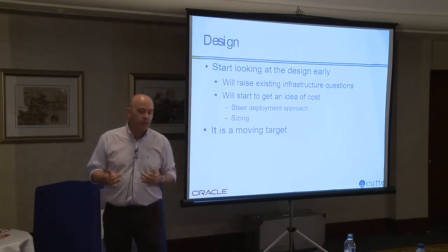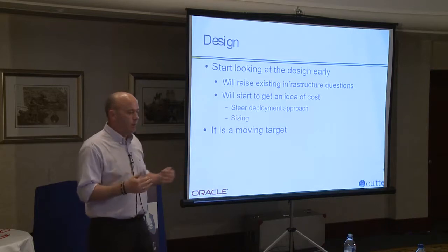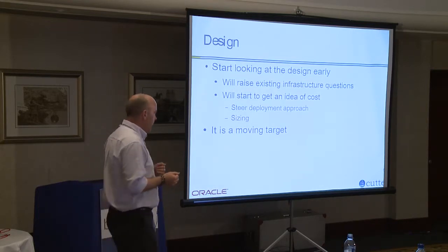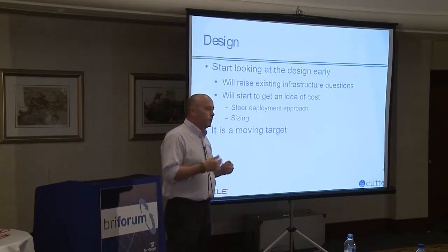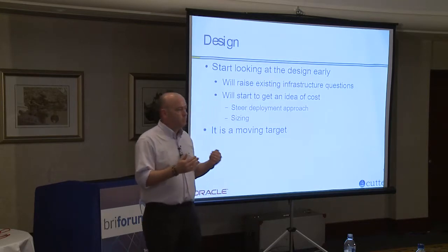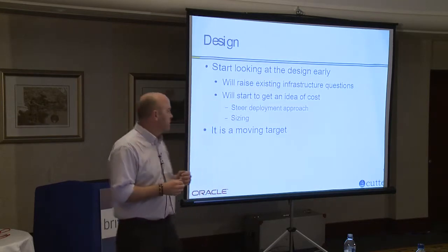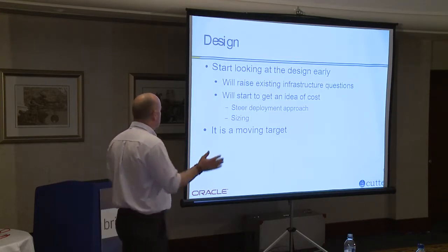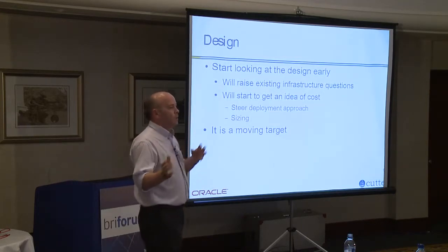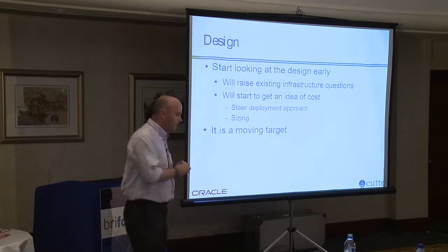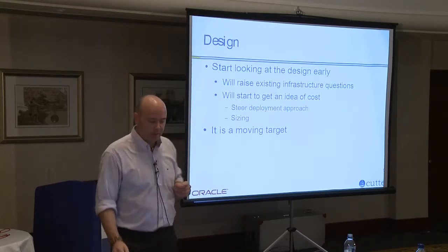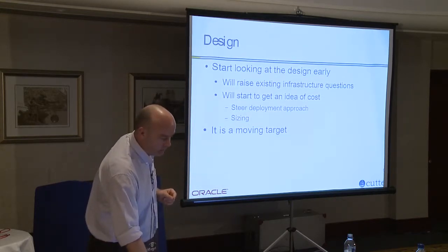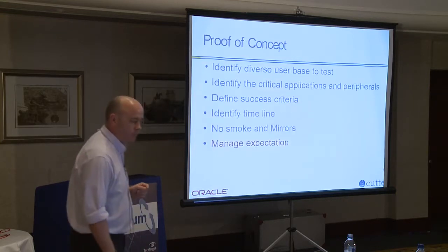One of the things that we found quite regularly is people are talking about VDI, and it's the cool technology on the block, but when you start putting numbers in front of them, they start possibly questioning whether they've got the business case to do it. Work with them at the beginning to get the business case as well, and it will steer you to a deployment approach, and it will also sort out your sizing. It is a constantly moving target, and I mean a day-to-day moving target on the large-scale deployments as well.